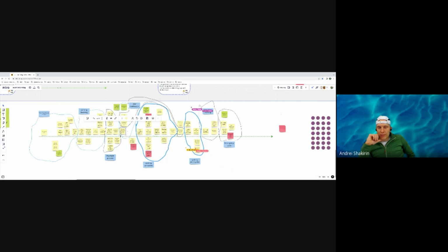The purpose of the last step is to try to identify the thin slice. So it's a process that will be small enough and easy enough to be implemented in the first step, but still have value for the user. So the user can park, can pay. Perhaps they cannot choose all payment methods, or perhaps we don't manage some emergency situations, and we don't provide an ID card to log in, but the user can benefit from our main functionality.